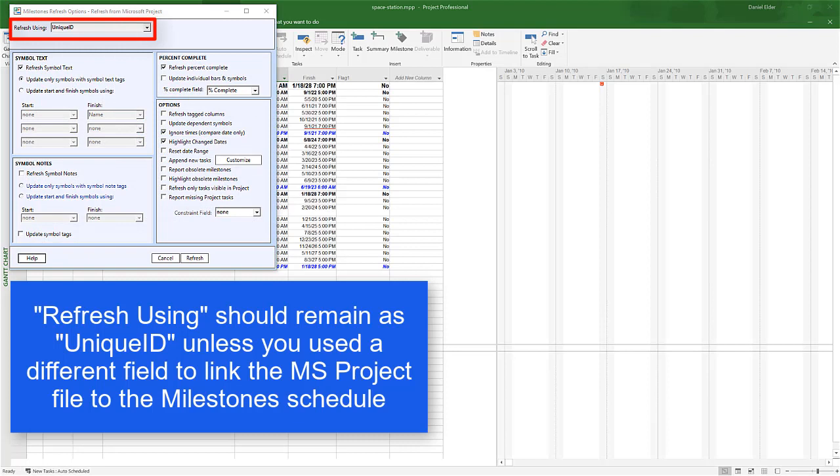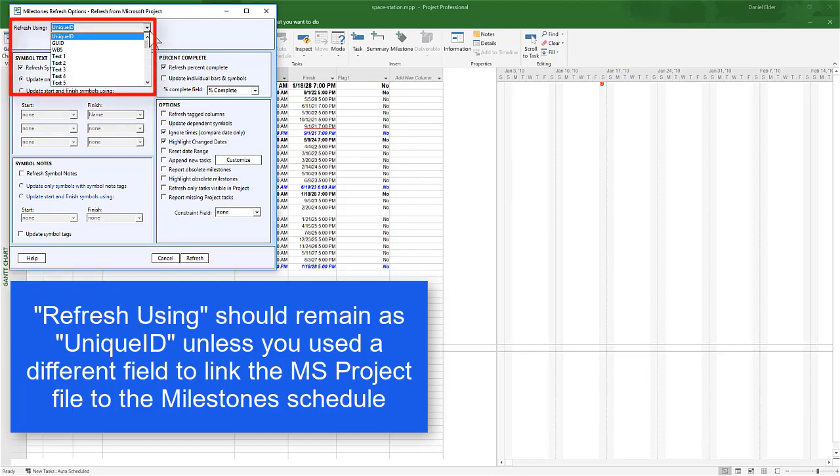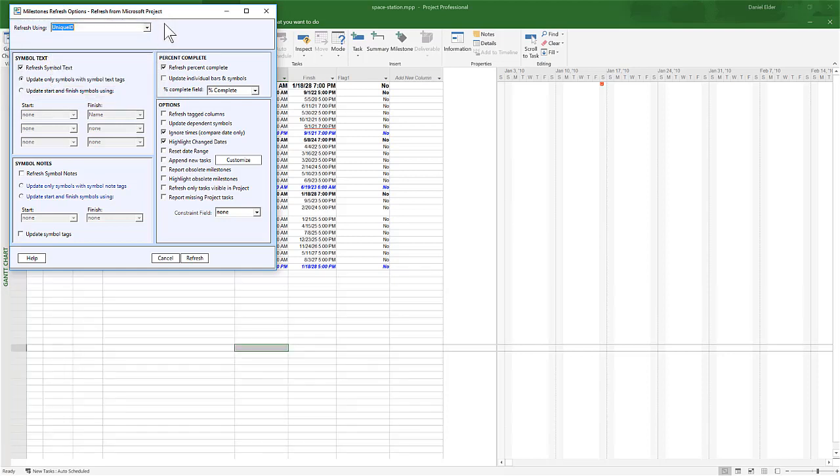The first choice you'll see on the Refresh screen is Refresh Using Unique ID. You'll want to keep this as Unique ID unless you have some kind of special circumstance where you're refreshing using some other field in Project.